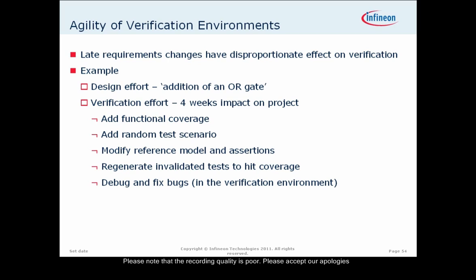I've got a pretty extreme example here, but it actually happened in a planning meeting I was involved in. A late change requirement came in. The design engineer involved said, okay, this is simple for me. All I have to do is put an extra OR gate into the design, and the job's done. Then we analyzed the effect on the verification, and it turned out to be 4 weeks. It's a slightly awkward situation to be in.